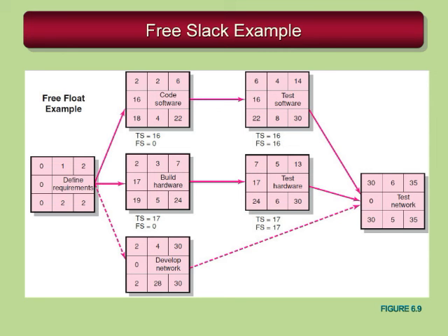Well, if I take any of the slack up in build hardware, or any of the slack up in code software, the people involved with testing the hardware, probably a different organizational part of the company, would need to know about that, because they're not going to be able to start their activities on their early start date anymore if you don't finish on the early finish date.